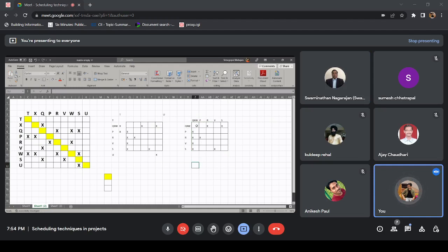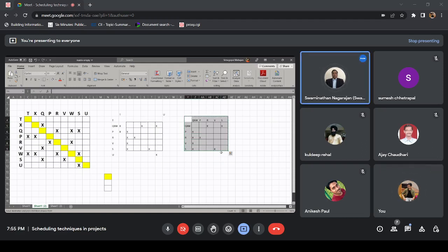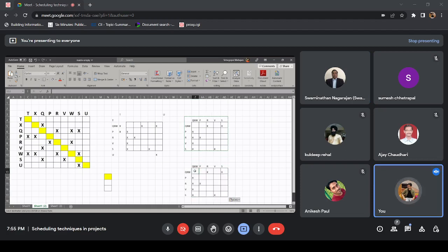As you can see here, the diagonal element is coming non-zero. Sorry, the diagonal element is 0 still. But there are no empty rows and no empty columns. We don't know what to do. So the best way would be to move forward with matrix multiplication again. So Control V. Again, I am not using the formula.